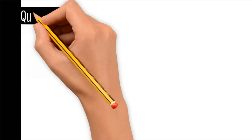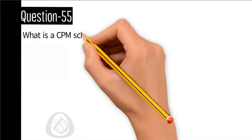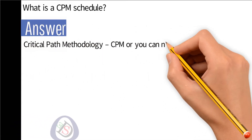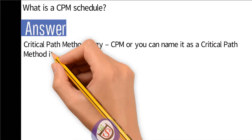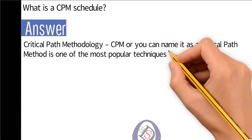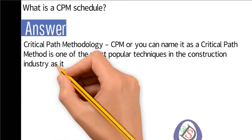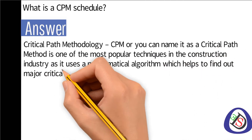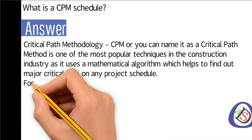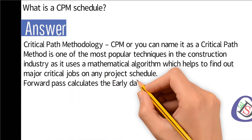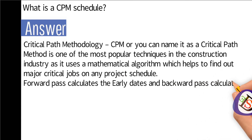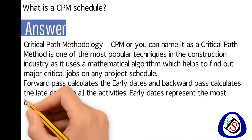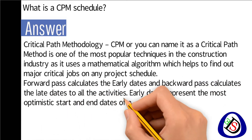Question number 55: What is a CPM schedule? Answer: Critical Path Methodology, or CPM, is one of the most popular techniques in the construction industry. It uses a mathematical algorithm which helps to find out major critical jobs on any project schedule. The forward pass calculates the early dates and the backward pass calculates the late dates for all activities.